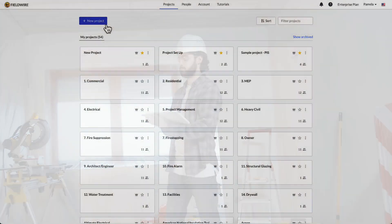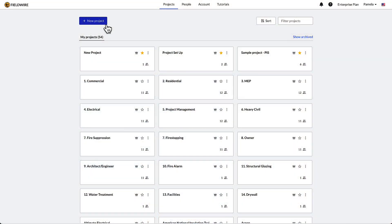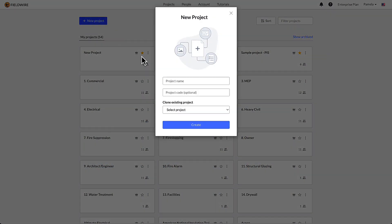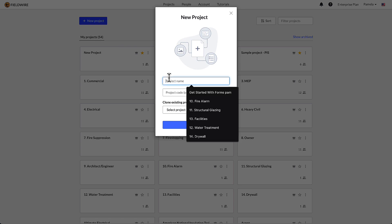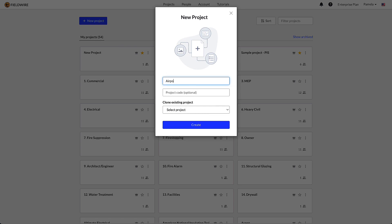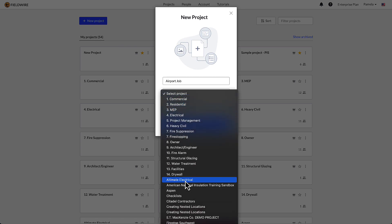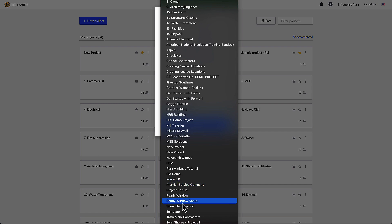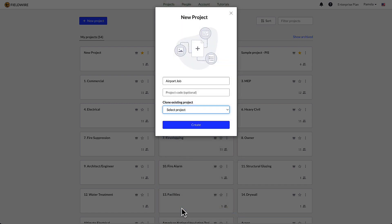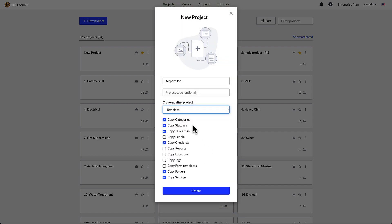From the Fieldwire project launch page, select the plus new project button. After naming your new project, choose an existing project to clone the categories, statuses, attributes, and more from the click of a button. Make sure the correct boxes are selected after choosing a project in order to copy them into a new project.